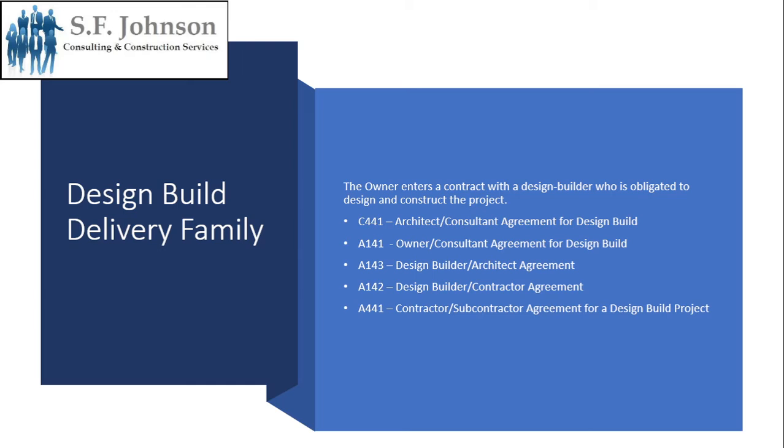Next, the design, build, delivery family. So the owner enters in a contract with the design builder who is obligated to design and construct the project. And so if you are part of this and this is beginning to be more popular, this should be the set of documents that you should see, sign, review. C441, architect consultant agreement for design build. A141, owner consultant agreement for design build.